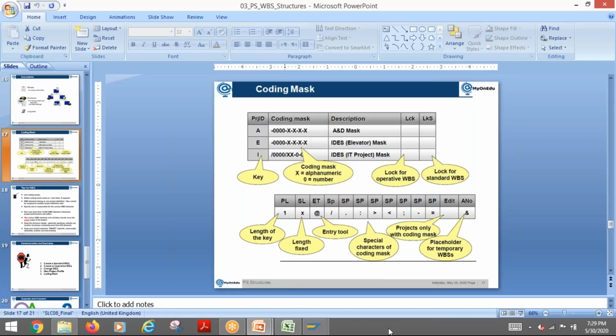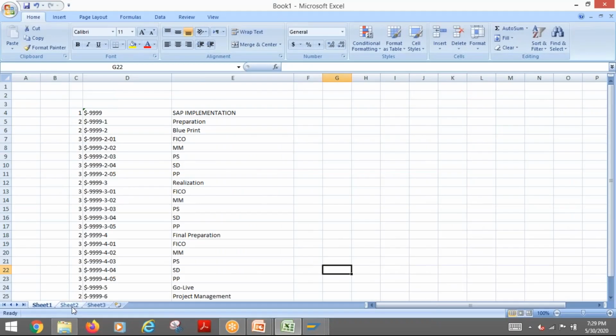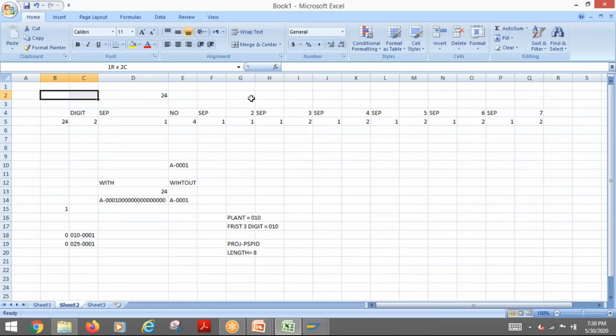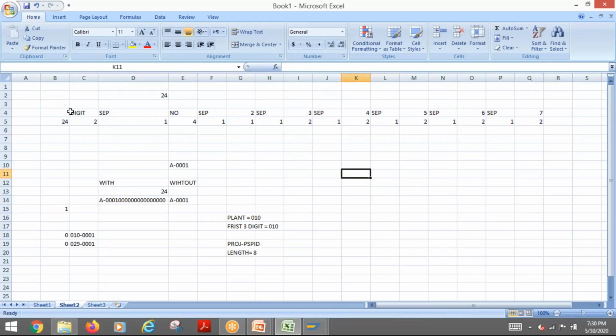That is why we initially decided it like this. I proposed 2 digits for level 3 and level 4 as well, so that they can go up to 99, like 1.99. So this is what you need to decide first. This is a 24 character field.